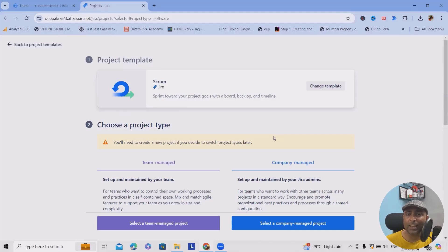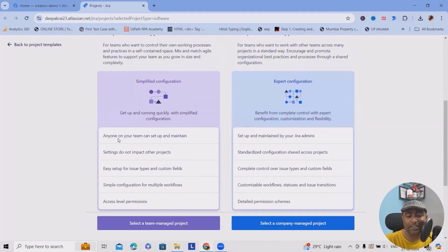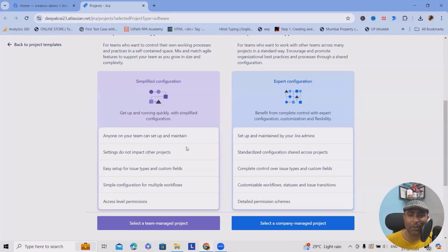With company managed, for any single bit of information to update, you need to request your administrator. Any rules and regulations you want to add within a project, you always need to reach out to your administrator. Team managed projects can be set up and maintained by anyone on your team with proper knowledge of the tool. Settings do not impact other projects, and it's easy to set up for issue types and custom fields, with simple configurations, multiple workflows, and access label permissions.